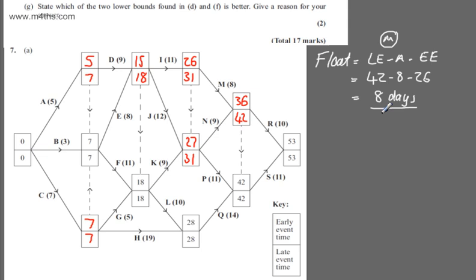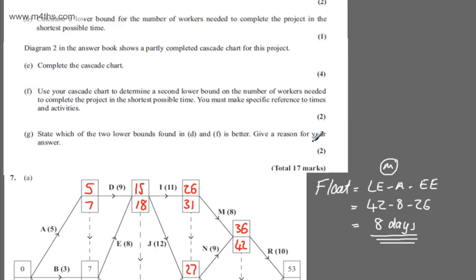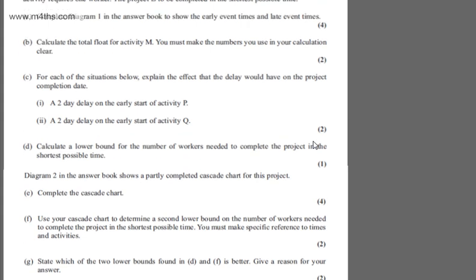This tells me I can kick my heels for 8 days before I start M, and it won't now knock the project time off the critical time of 53 days. So I've done that part's done as well.